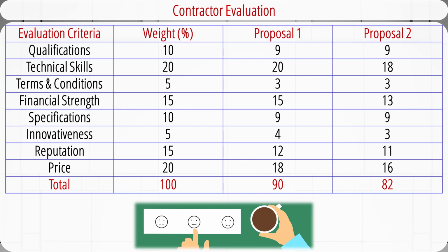Interested contractors respond to the project request for proposal with a written bid proposal. The proposal review committee will select the contractor who best meets the requirements. The selection criteria given in the request for proposal are used to evaluate which contractor is awarded the contract to implement the project.